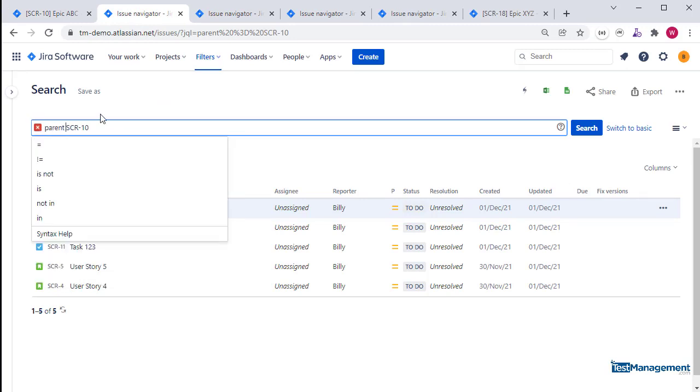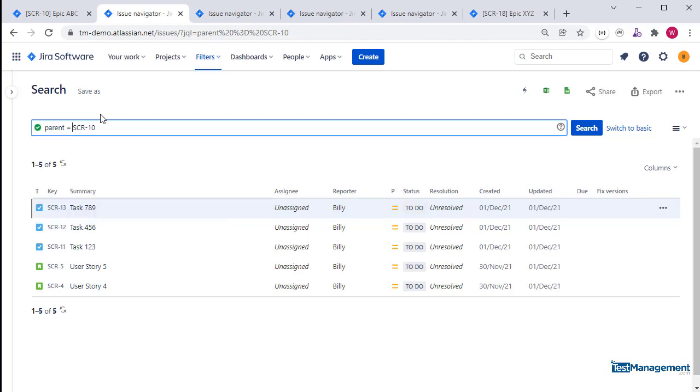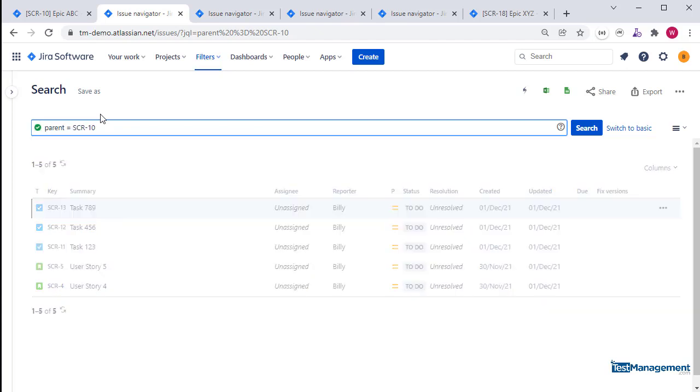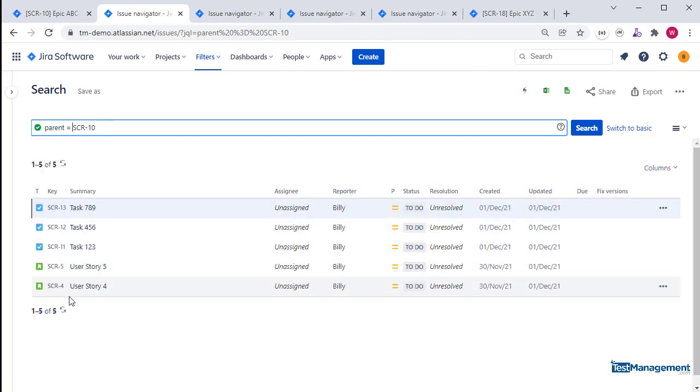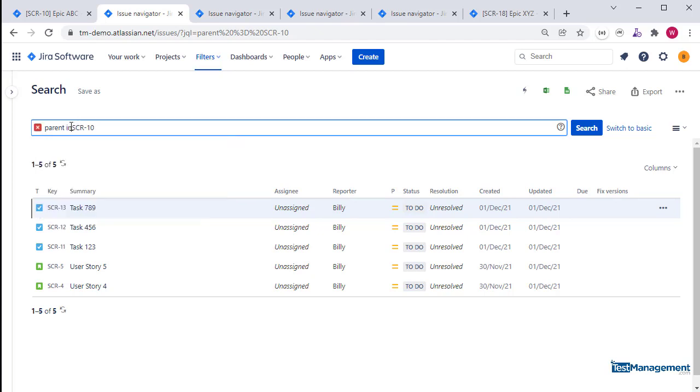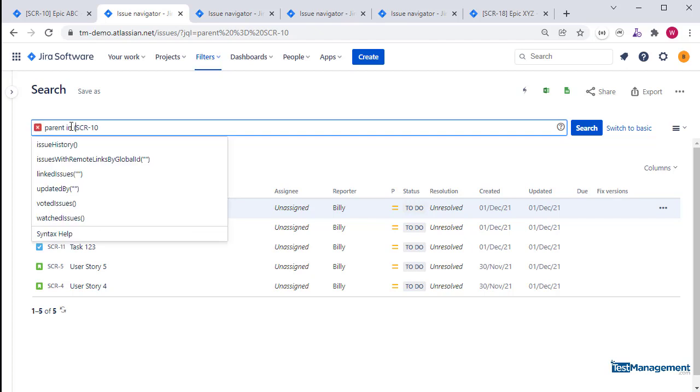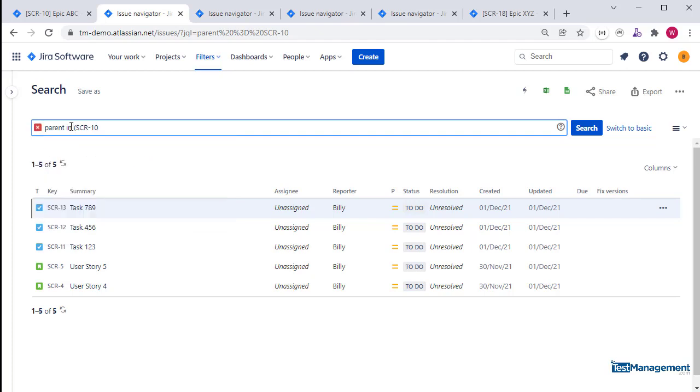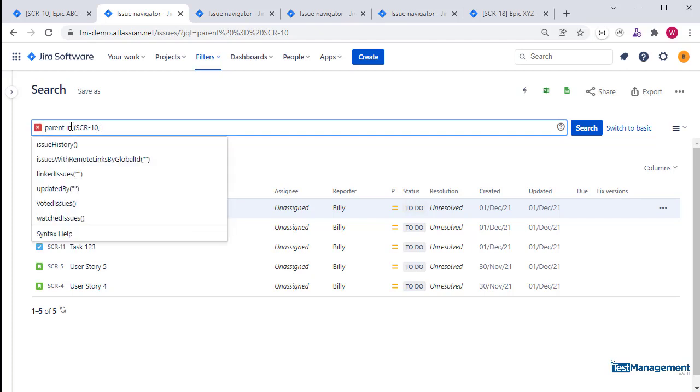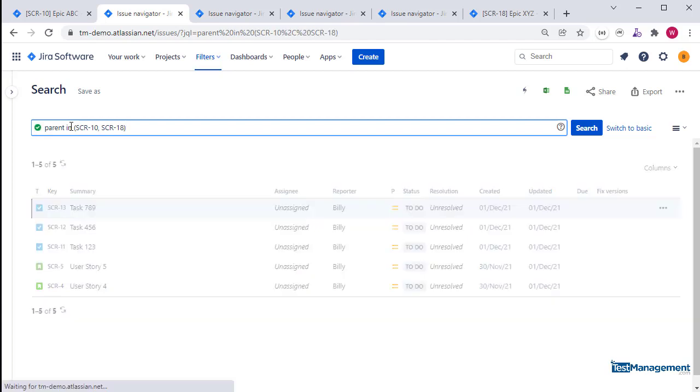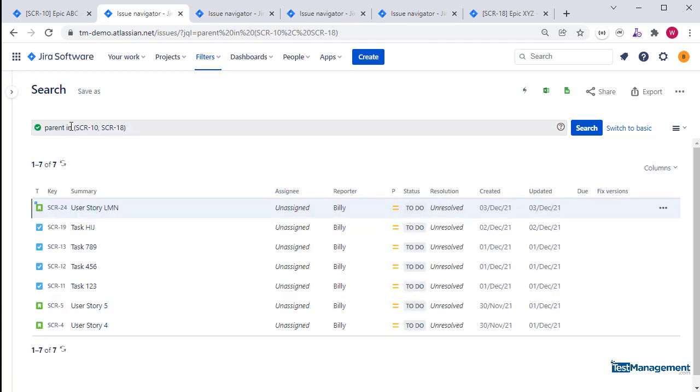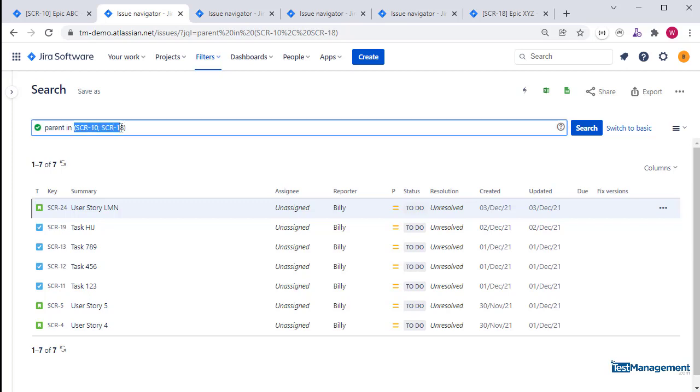Parent equals SCR-10, and what we get back is a list of issues that are child issues of SCR-10. If we want to search for child issues of multiple parents, then we can use parent in bracket SCR-10, comma SCR-18, and provide a list of parent issues. Then we get all of the child issues for all of the parent issues.